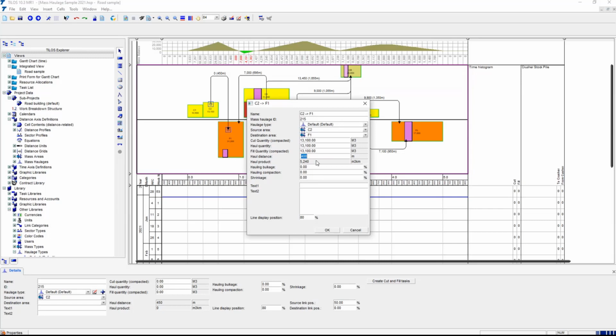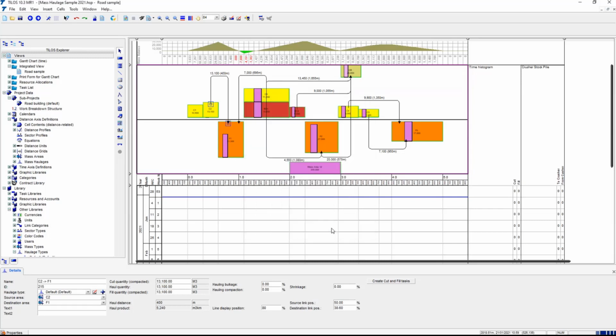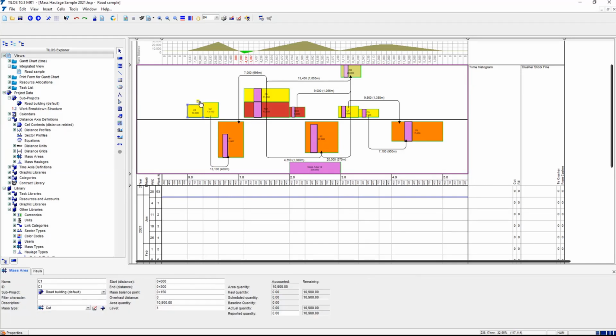We know where it is in distance, and we know the quantity because we've already said that. So all of that can go into this fill area. And so the purple sort of temperature gauge says, well, great, you filled up quite a lot of it, but it's not full yet. So you can see which bits are not full, etc.